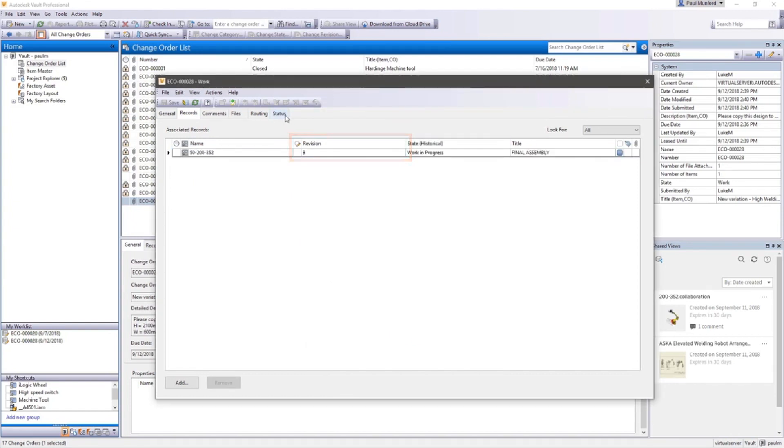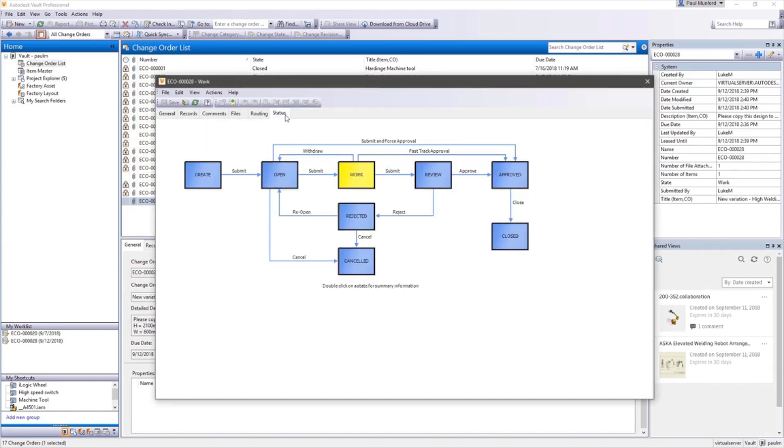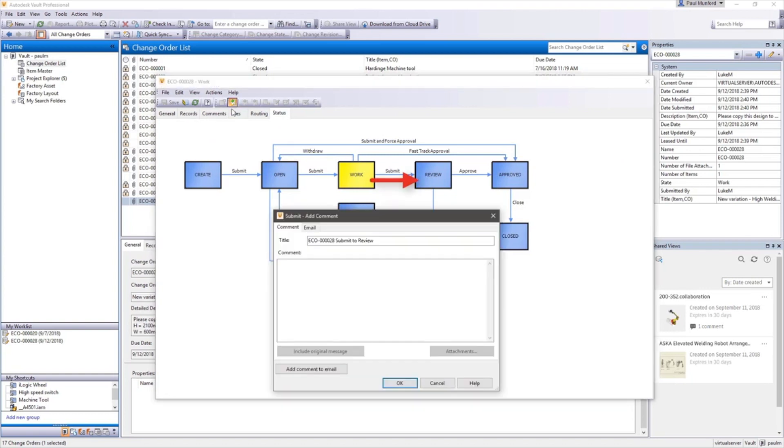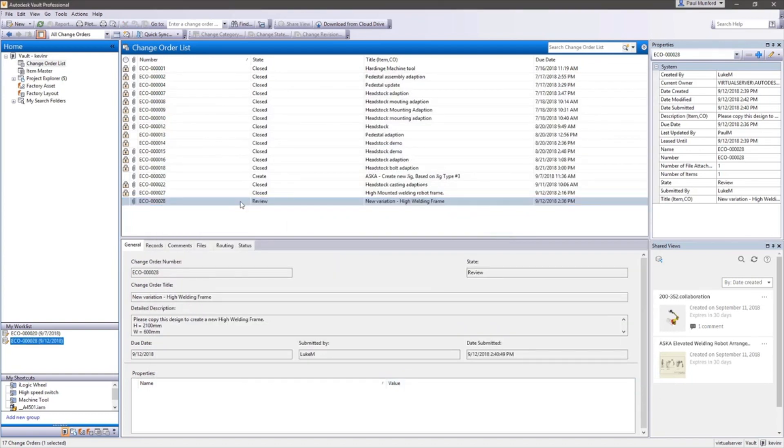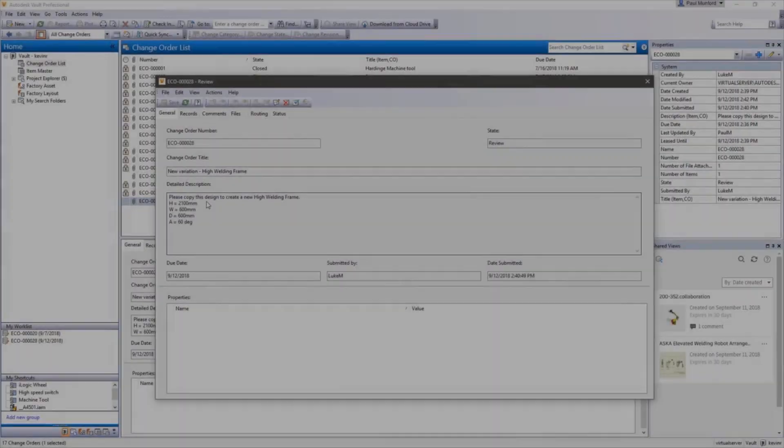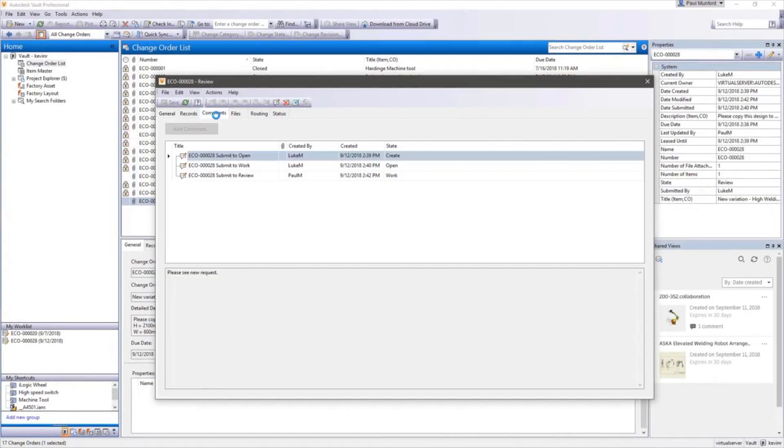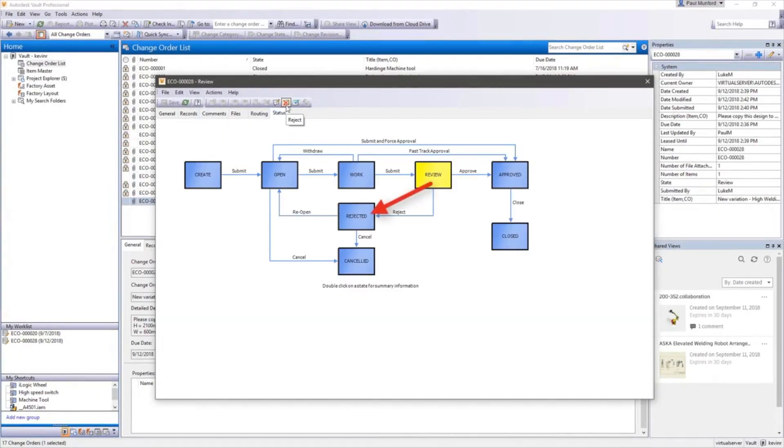Once design documents are edited to reflect the required changes, the change order is processed to the appropriate state. Once changes are verified complete, a final approval is given and the change order can be closed.